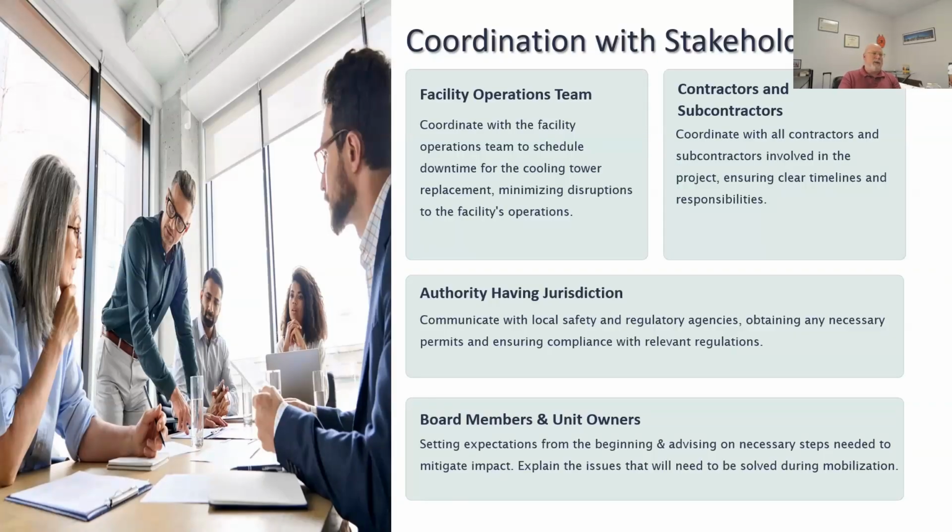Another approach that I've seen when we're replacing cooling towers, we'll have the contractor go rent air conditioning equipment and put a standalone, self-contained air conditioning unit in every unit. For a smaller building where we have 24, 30 units, that might be feasible. For a larger, 35 story building where we have 200 units, that's probably not going to make sense. We're probably going to want to lean more towards doing a temporary tower if we're going to have to be down for days. But again, it goes back to planning with the contractor and getting the right contractor and making sure.